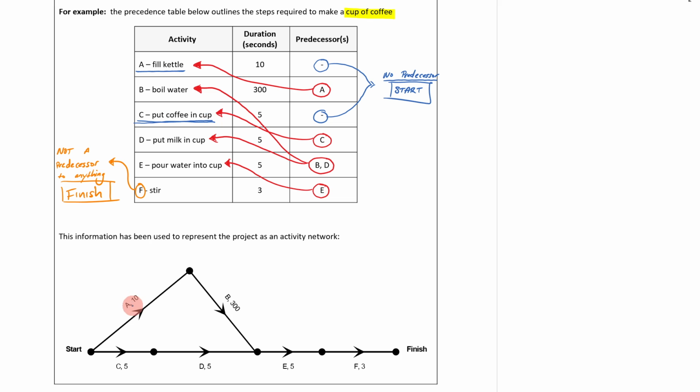So as you can see here, what makes activity networks and precedence tables different to what we've seen previously with graphs and networks is, do you see here that we actually label the edge with the letter and the number there? We label the edge and not the vertex. So take note of that. That is how an activity network is different.